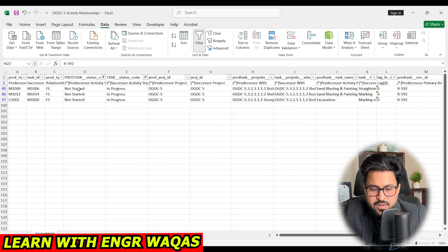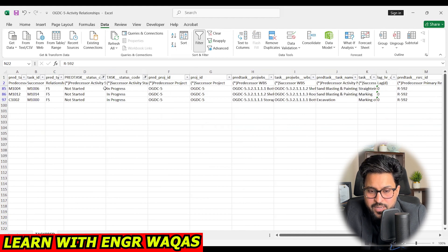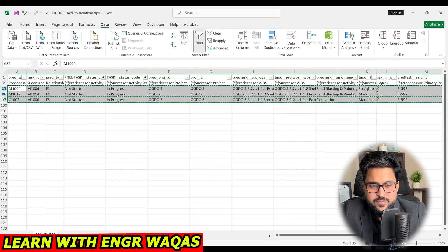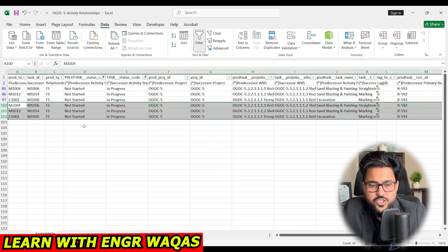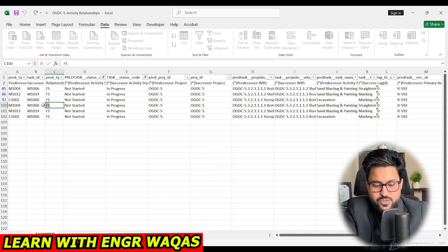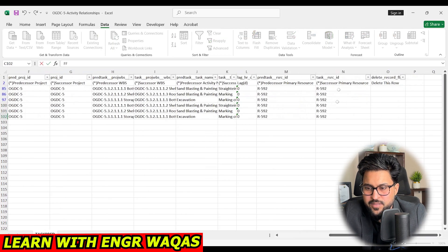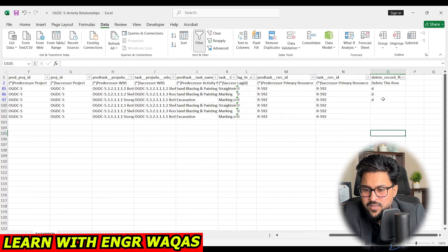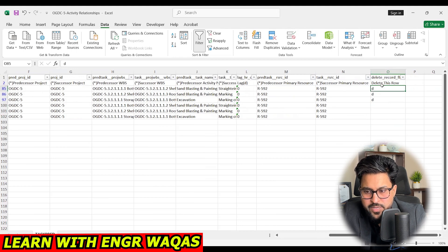These are the troublemaking activities — where the predecessor is not started but the successor is already started, that is a problem. These activities are creating the out-of-sequence situation. I make a copy-paste of these. The successor activities are already in progress while the predecessor is not started, so the appropriate relationship is finish-to-finish. I mark the original rows with 'D' to delete them, since we are replacing those relationships.